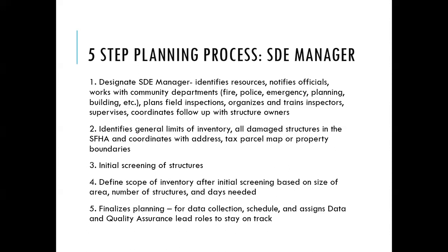Then you're determining what the scope is so that you can plan those field inspections, and then you're going to organize and train the inspectors to collect that field data by hopefully having some pilot assessments where you all do it together so that everyone's kind of on the same page about what data needs to be collected and what the different levels of damage look like so that you're all in agreement and that it can be done consistently.